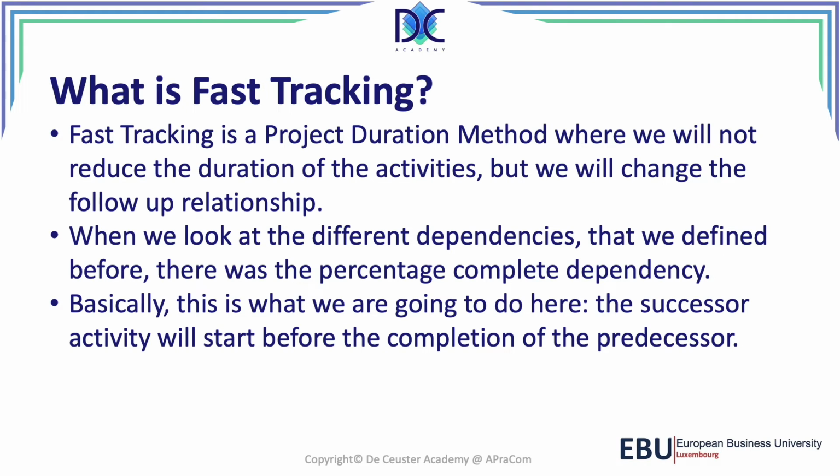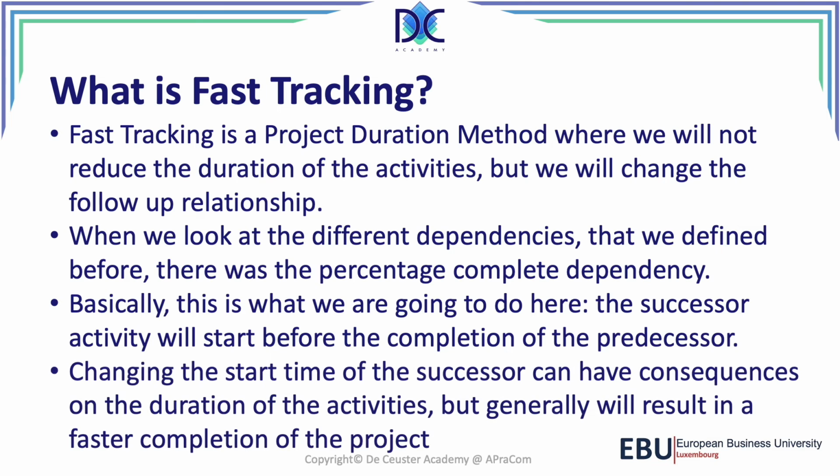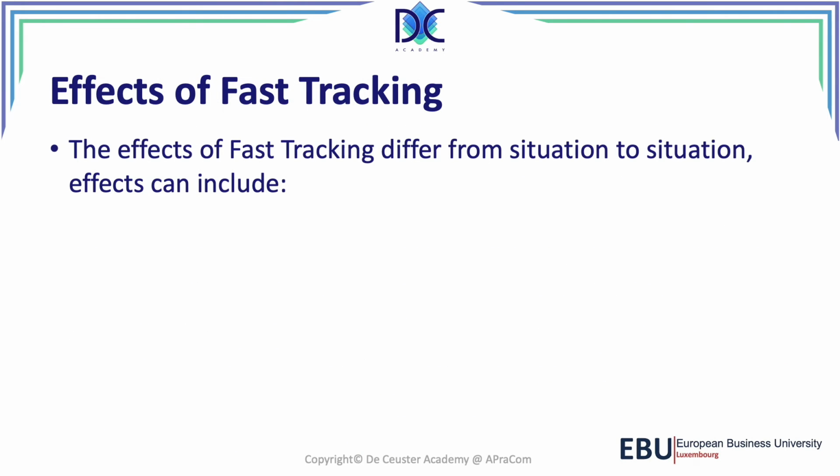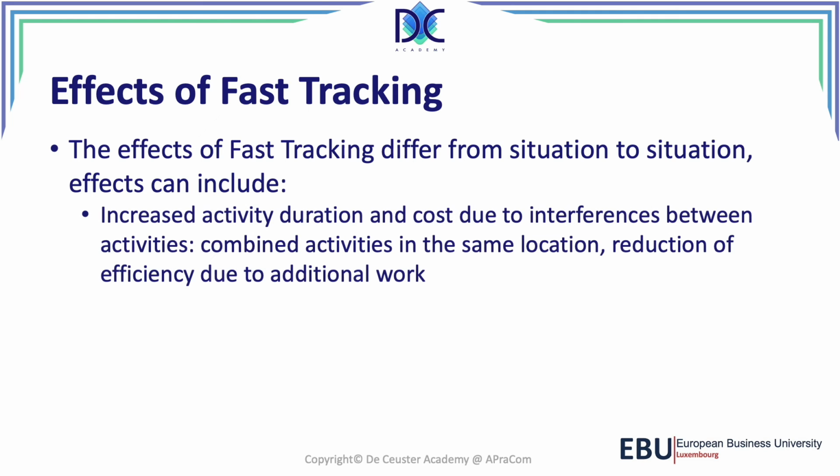We can do this also with leads. We can put a lead so that we will start working at an earlier time than originally planned after finishing the activity. Now, the start time of the successor can have consequences on the duration of the activities, but generally it will result in a faster completion of the project. We may have some effects because of fast tracking. Now, what are these possible effects? We have different effects from situation to situation.